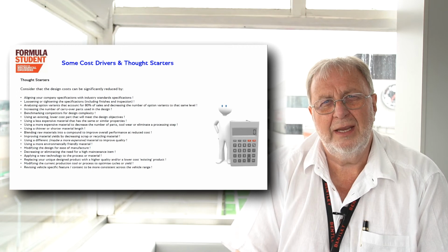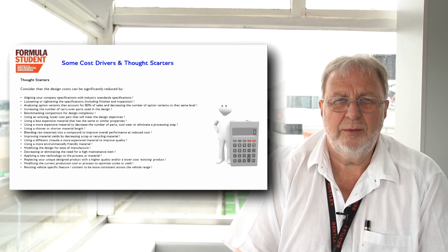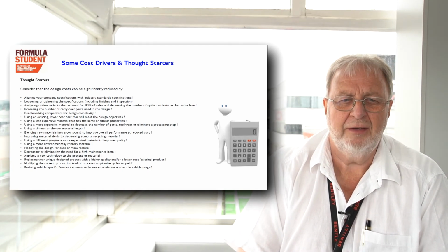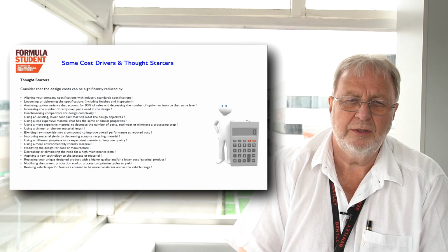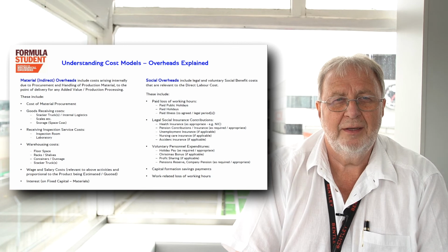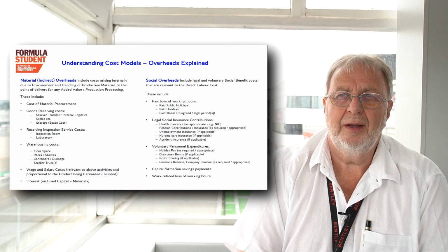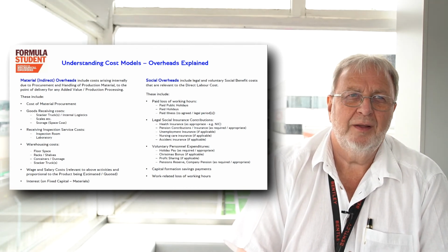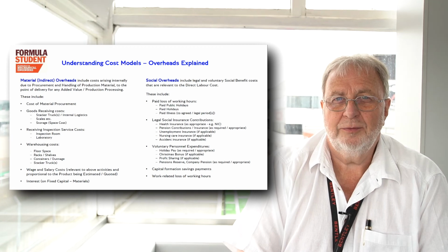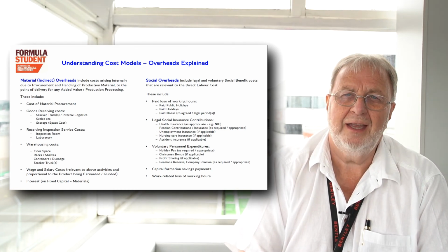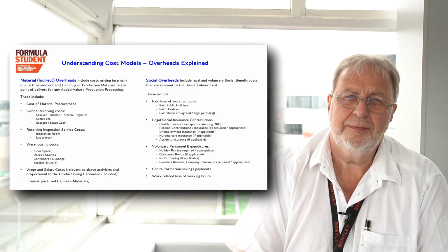With your calculation of labour, understand what the overheads and the labour cost elements are. There's again some examples here for you to understand that and to build that into your equation. The other area that we often challenge and we get no answers to is, where did your times come from? It's no good telling us that we took the times that we checked into the facility to start work, and we checked the time when we stopped and left the facility. We need to understand how long the operation activities took.